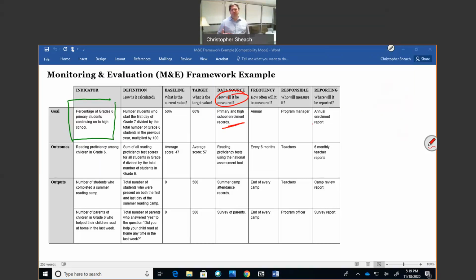That's your data source. Sometimes you will want, or a donor will request, a secondary data source. Sometimes these are just an additional piece of evidence. So for example, for a construction of latrines, you might give the GPS coordinates, and you might give the materials list that was used, showing those materials were purchased, showing that the labor cost was put in by paying somebody, and you have the GPS coordinates to verify exactly where it is, and you may present that to the community as a signed agreement saying the community has received from your organization these latrines.